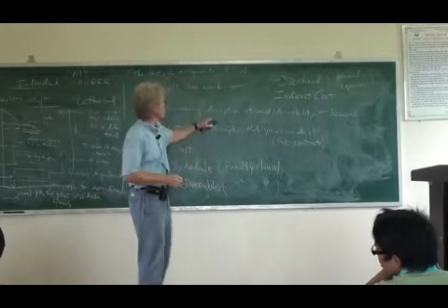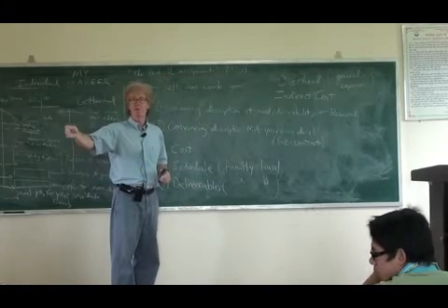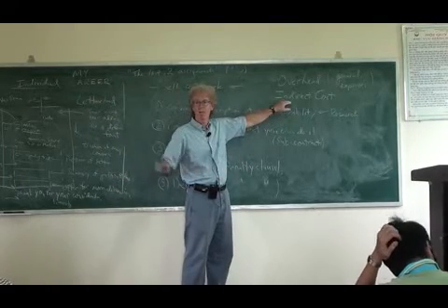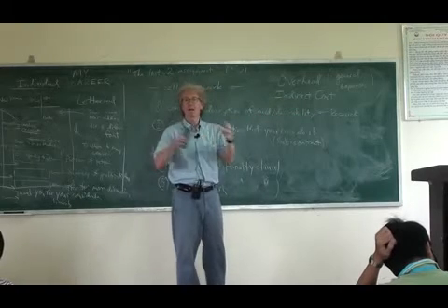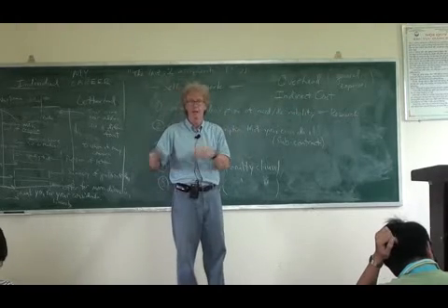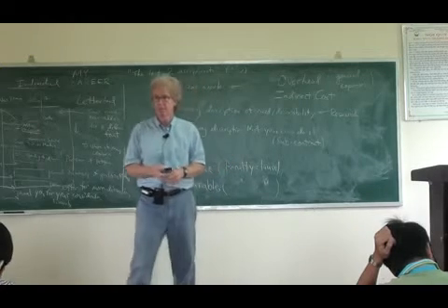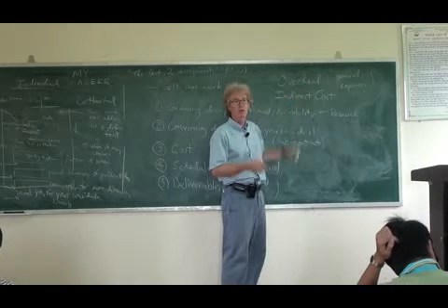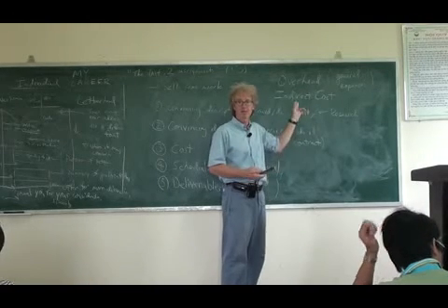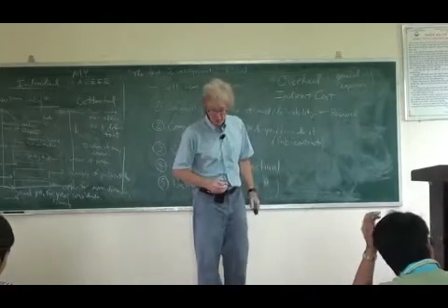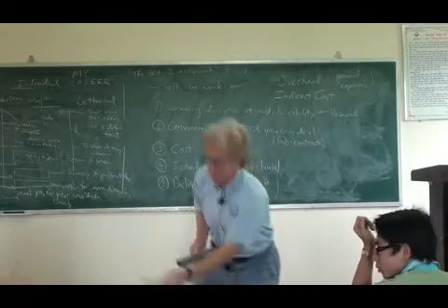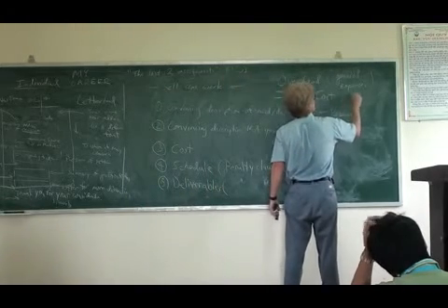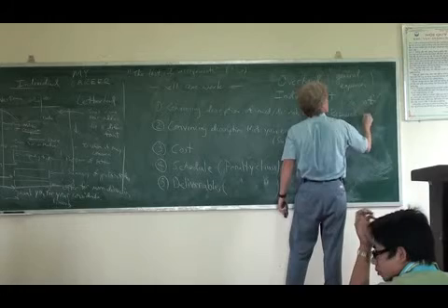So it's the same idea with the company. If you build your own factory, or you build your own office building, that's going to cost a lot of money for a long time to pay that off. You get a little bit of that out of each project that you do, but you have to get some of it out of each project or you can never pay for it. That's the so-called indirect cost, the overhead. So when you give me your proposal, be sure you have an estimate of indirect costs. Now, for most companies, this is calculated as a percent of direct cost.